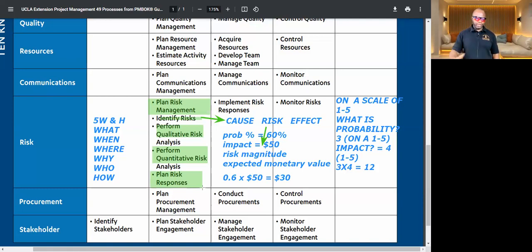We're going to do everything possible to avoid it. So every day they put up their notice of 500 days without a fatality. They have a health and safety check. They go through routine and protocol all the time, make sure people are wearing their hard hats, make sure people are harnessed when they're doing stuff high up, and all that stuff.